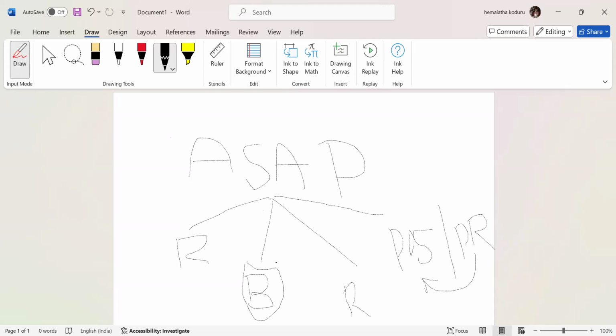Once the necessary approvals are received, you will start your design. That is called the realization phase. In the realization phase, you start building your configuration as a functional consultant, with whatever changes and client expectations there are. For example, normally in a standard manner we have only one physical year, but maybe the client expectation is that two physical years should be activated for their business.